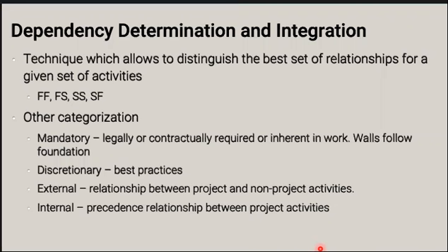And then, within this activity, we're going to see which of those dependencies is the most real life-like. The dependencies can be either mandatory, so they must be like that, or they can be discretionary, so they should be like that, based on internal rules and procedures or external regulatory requirements.